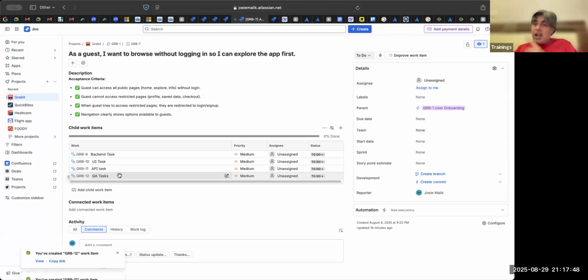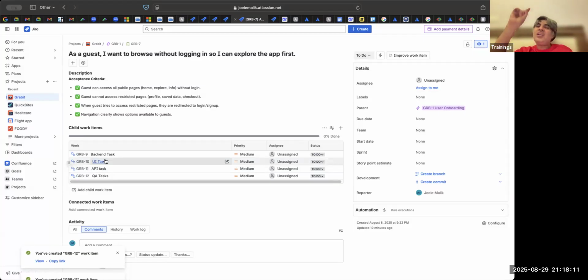Do you all understand this? Yes. Is there anybody that does not understand it? No. Because this is a very, very simple and basic story. But it has a UI component, an API component, and a backend component. Whenever you are choosing a base story, make sure you have at least two layers, if not three layers, to that story. Don't use just 'I have to create a radio button.' That is a one pointer. That is a rookie Scrum Master mistake. Don't make a very simple, unrealistic story.